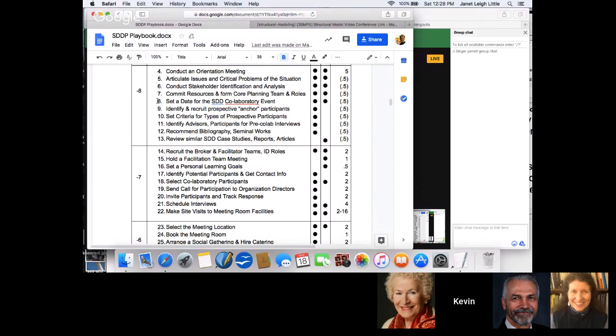So if you're getting a scientist on pharmaceutical safety, you want to make sure you're not scheduling your dialogue within a few week window of a conference that they're likely to go to. So that takes some homework.